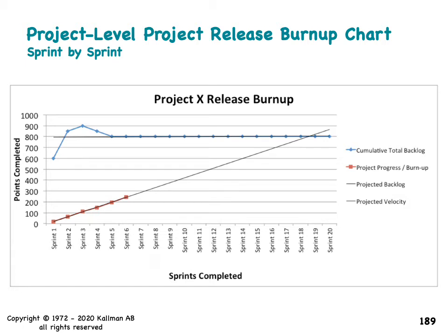Now, the project was also tracked on a sprint-by-sprint basis. And on a sprint-by-sprint basis, if you know the total size of the backlog for what's going to be released for a specific project, after 5-6 sprints, you're going to have a relatively accurate picture on whether or not they're going to make it within X number of sprints. And for this one, it looked like 20 sprints, which was almost a full year's worth of effort for this project. And you can see that they were estimating that they were going to end potentially a sprint or two earlier than what they had planned.